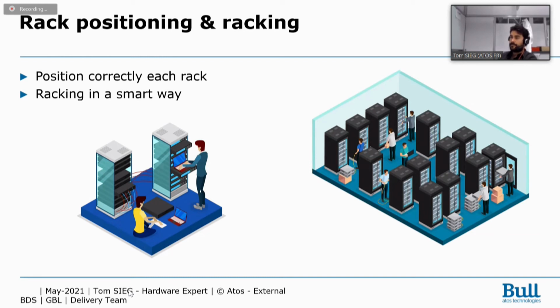If you can leave your rack fully open, without doors and without side panels to be damaged extra, it will be easier to install the rack and the servers into the rack. That's all for the racking and positioning parts.